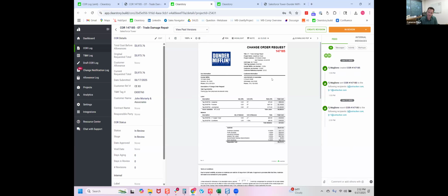Yeah, and to double down on that too, maybe earmuffs to some of the GCs on the webinar, but to TJ's point, any change order that has merit, we can almost always find budget to cover that change order request in our allowances or contingencies or somewhere in our budget, so long as it's surfaced quickly. The times that we can't cover it are when so much time has passed and maybe we've already exhausted that allowance or contingency. And that's when it puts the general contractor in a really tough spot.